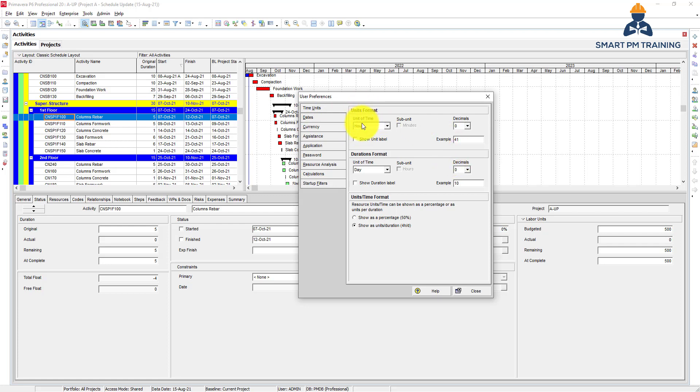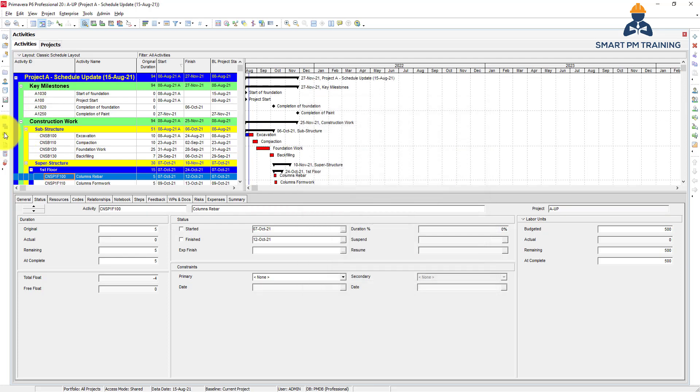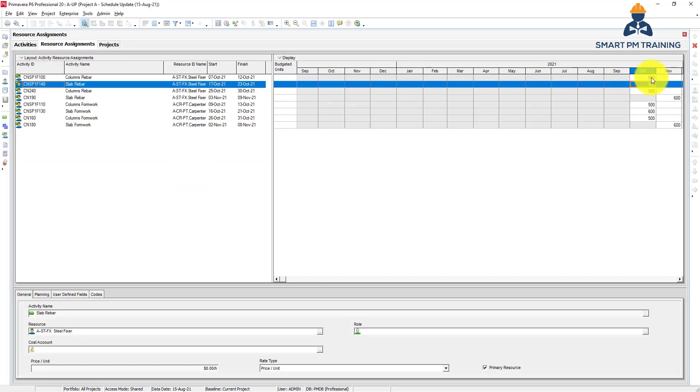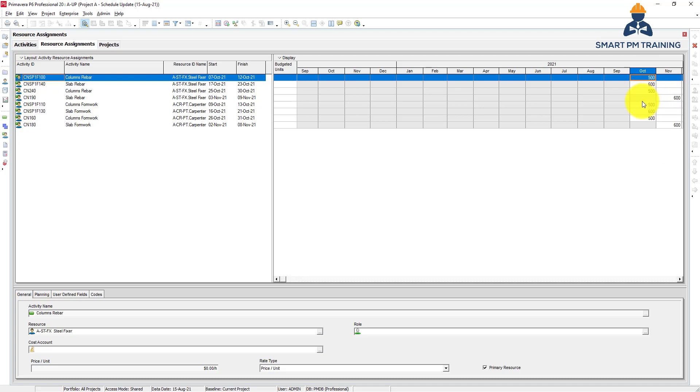When we dealt with resources, whenever we referred to units it's actually hours for labor resources. So it will ask you here, do you want to keep it as hours? When you mention something, let's go to the resources here. Do you want to present everything in hours? This is all labors. Or do you want to make it days? This is how you specify, but by default hours are fine.